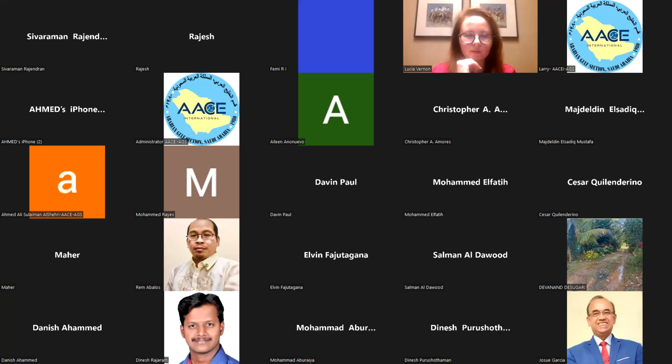Oh, when you have change orders and a project is in progress, what your project team, your planner should do is prepare the fragments for this change order, identification of the scope, and introduce this fragment into the updated schedule and show the impact properly linked. So that is what your planner should do every time when you receive a lot of change orders. Because at the end, when you still go without the correction or proper implementation of the scope, what are you building at the end? Your baseline does not match with the actual work scope. So it's very difficult. So I guess which method will it be? Time impact analysis at the time when the delay event or change happens. Okay, fine. Thank you. Yeah, welcome.